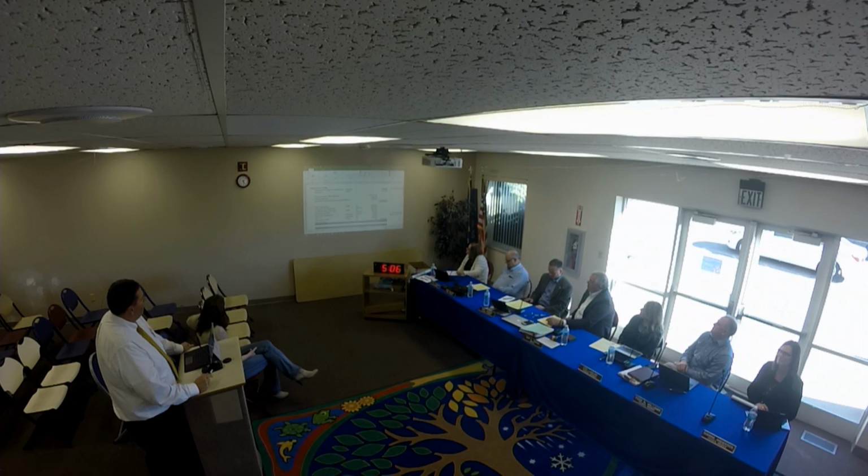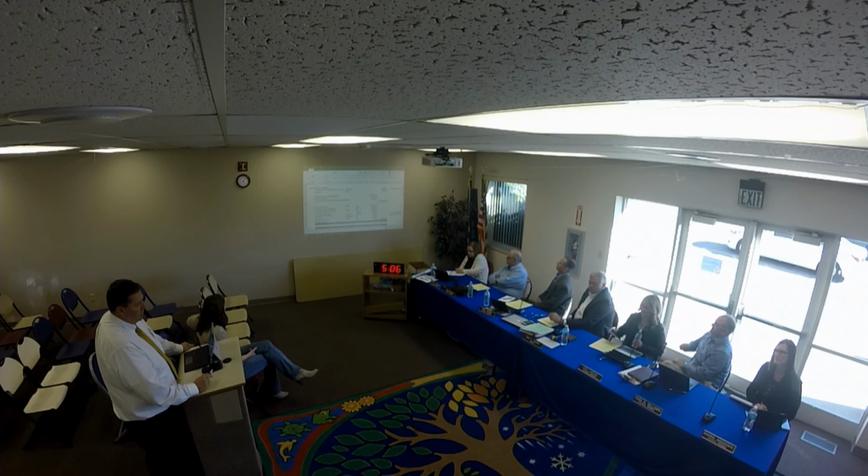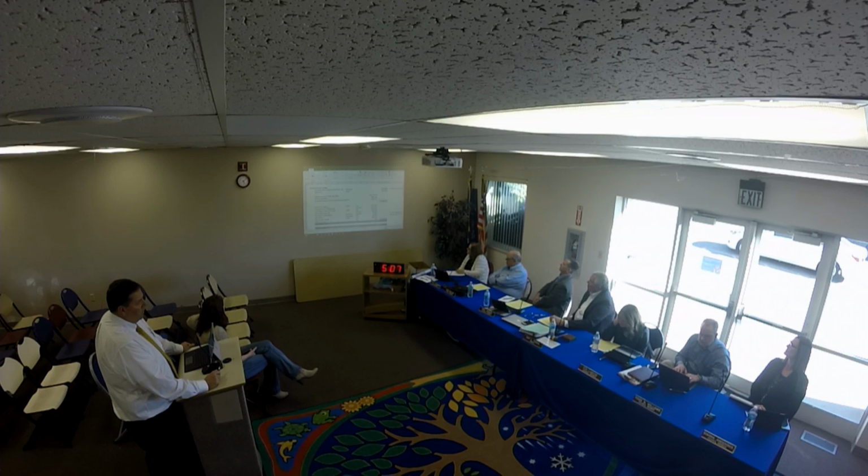That number right now is probably going to be a little bit low, because we were hoping initially when we started the project that we'd have the fire department out by September or October, and that's probably going to push now into December, January. So as we continue to go through this budget, we'll make small amendments. The demolition cost is right here. That's an actual, because our initial allowance was $150,000 and we got it done for just below that. And then this goes back to the numbers that I was showing you, which was the sticks and bricks, the general conditions, and then the insurance allowances and the contractor fee and contingency. So this 1106, when you add that with the 147,670, that gives us our guaranteed maximum price of $11.9 million.